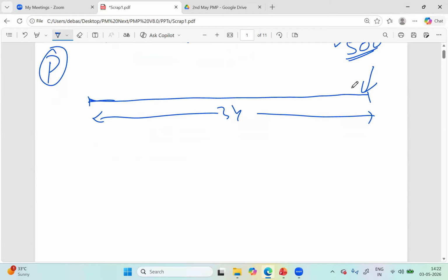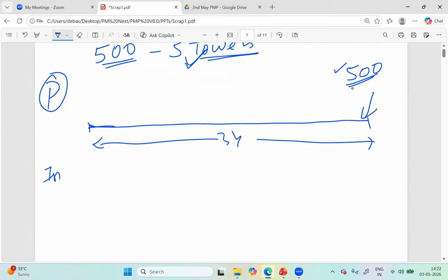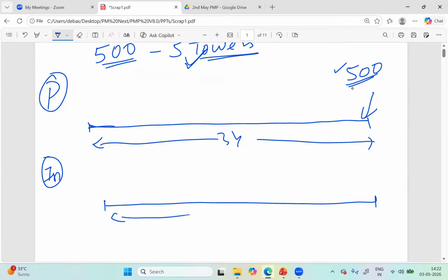Now watch, I'm going to deliver the same project, this time using incremental. How would it be different? Watch. Again, a 3-year project, no sooner, but here the approach is a little different. What we're going to do is break down the development into iterations. Iteration 1, iteration 2, maybe iteration 3. Look, in predictive, we don't do that. Here we break down. Now come back to iteration 1. The basics will remain the same. We start with excavation, then foundations, and then raising the towers.